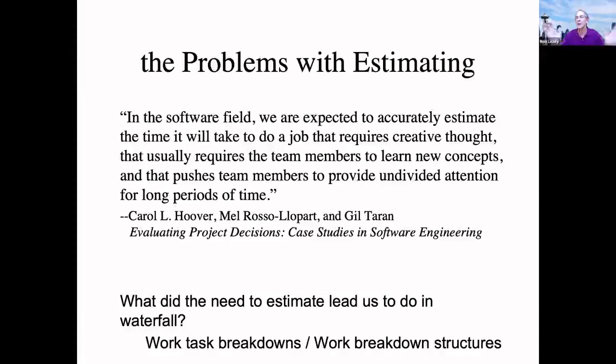Taking the whole project and dividing it down into stories, or if we're already at stories, taking the stories and dividing them down into every single task that we could have to do, putting time against those, adding up the time for all the stories, and now we can walk out of a dark room that we just spent days in doing this with an estimate that is wrong. It was inevitably wrong.